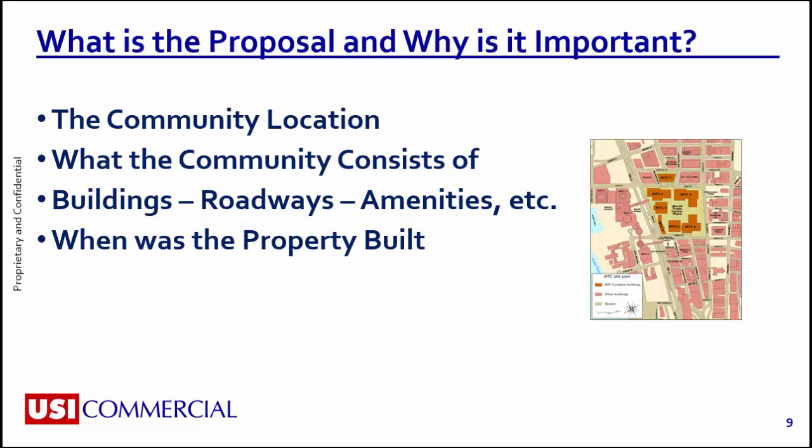Well, just like any major line item in a budget, the reserve study should be reviewed each year before the budget is established by your property manager. Invariably, some assumptions have to be made during the compilation of this analysis. Anticipated events may not materialize, and unpredictable circumstances could occur. Deterioration rates and repair replacement costs will vary from causes that are unforeseen. Earned interest rates may vary from year to year. These variations could alter the content of the reserve study. Therefore, this analysis should be reviewed annually, and a property inspection should be conducted at least once every 3 years.